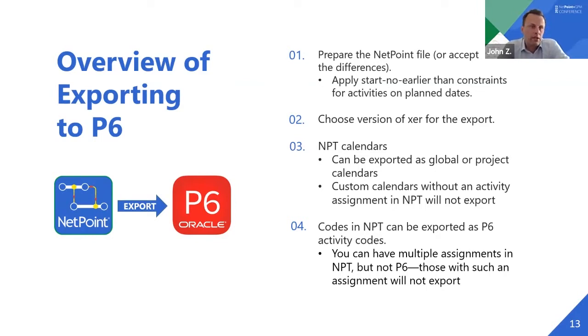And then calendars. Calendars have to be exported, but you need to choose if you want them global or project within P6. I generally recommend project calendars when you're coming from NetPoint, so as not to convolute your global calendar dictionary within P6, and we'll talk about that a little bit more as well.